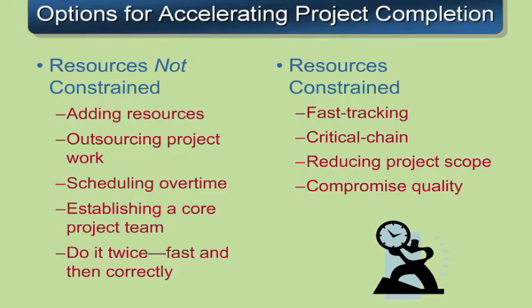We have a lot of options available to us for accelerating project completion. When our resources aren't constrained, we can add resources. Maybe we can do some outsourcing, schedule overtime. Maybe we pull people off their main projects so we can establish a core project team. And maybe under some conditions, if we're trying to meet commitments, we'll do the project twice. Yes, there are some times where we'll go double back on the project.